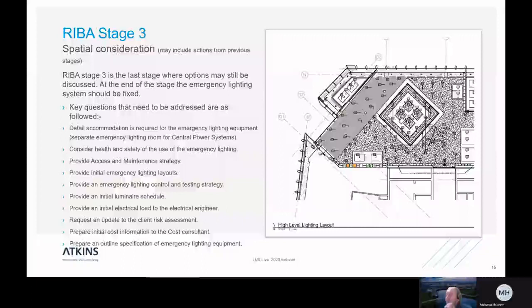And you can see that I've kept in again the risk assessment. So the risk assessment is a working document and should be getting improved at each stage, and you should have regular meetings to make sure that you're picking up and addressing the points that were in the initial risk assessment and they move through into the final risk assessment. It may be a meeting of an hour, no more than that.